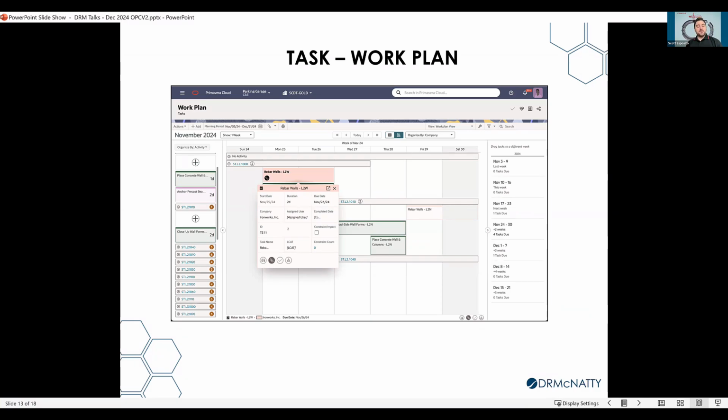And then what we're doing here is basically replacing what you would typically do on a wall with sticky notes that are color coded. So what we've done here is color code our specialty trades. And essentially, as we go through our pull planning exercise, we ask, hey, can you commit to doing this particular task? When do you think you can get it done? Right. So we might have to play with these tasks on the screen visually to get an optimal approach.